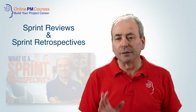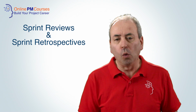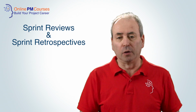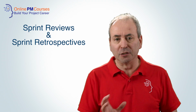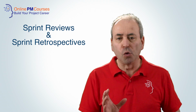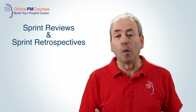The fourth difference is the use of sprint reviews and sprint retrospectives. And I've also done a video answering the question, what are sprint retrospectives, which also covers sprint reviews. In sprint reviews, we can also consider the impact of risks from this sprint on backlog items that we may bring into future sprints. And one use for sprint retrospectives is to sharpen the team's ability to manage risks in future sprints. The use of sprint retrospectives ensures that the team is able to hone its process and therefore get better at managing risk and delivering, and thus reducing risk, throughout the life cycle of the project.